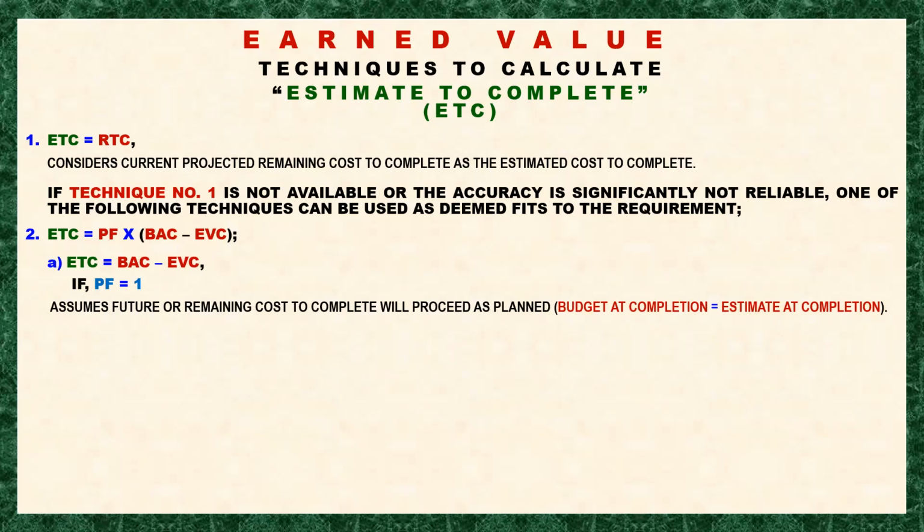In this technique, it could be that the project in charge has a gut feeling that everything is under control, right? So the feasibility of the budget at completion remaining achievable for the remaining work package is projected. In other words, the budget at completion for the work package is assumed achievable as planned.